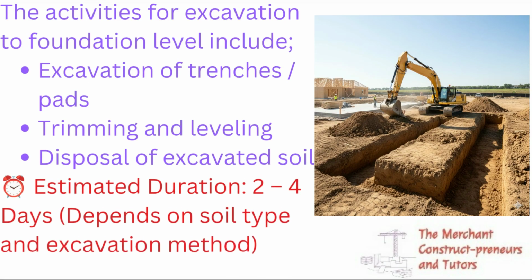So this activity for excavation to foundation level includes excavation of trenches or pads, depending on the type of foundation, trimming and leveling, disposal of excavated soil. So the estimated duration is within 2 to 4 days, depending on the soil type, the excavation method, the site condition, if it is tight or it is spacious. So all these things come into place. So just know that the second stage is excavation.